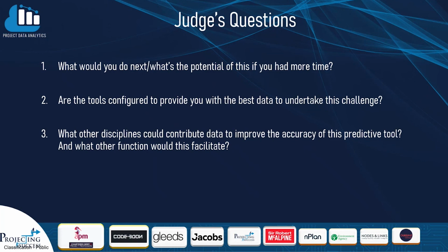This could also be useful and help facilitate commercial negotiations of client change, as we would then be able to track the impact that the change has had on the design of the overall project and other factors, such as if this has caused more BIM collab clashes within the impacted area of the change.